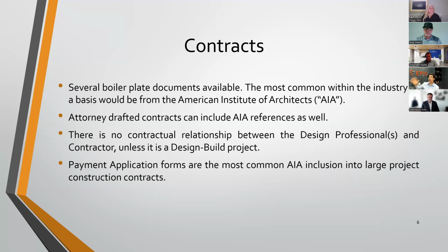Even if you don't want to utilize AIA for whatever reason, the most widely used forms from AIA are certainly the payment applications. That is a very valuable tool, certainly something that should be reviewed as part of any project, just to have a level of expectation as to what you're going to get. Because you don't want to be surprised in the first month when the contractor, not to say they would, has something very informal that says, you owe me $100,000 this month because I did 27.5% of the work. No, I'm going to need a whole lot more detail than that to release that, especially if you're on the board.